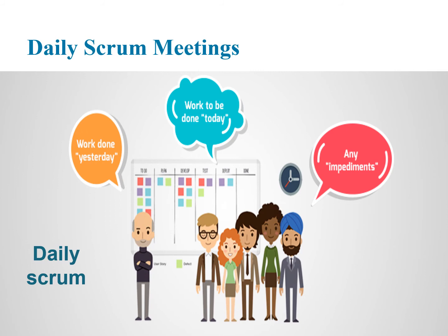It's a short meeting, normally a stand-up, just to look into three main things: the work done. So we discuss what has been done yesterday, the work to be done today, so the current task should be done, and then any obstacles or issues faced by the team. Normally it is held in the same location, in a standing form, and normally in the beginning of the working day.